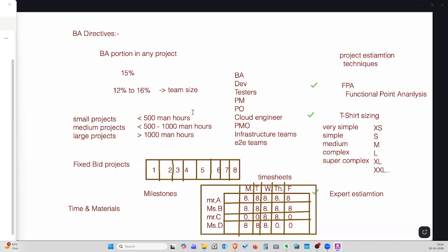And I will release the funds on a monthly basis. Every month you need to show me the progress. If you are showing me the progress, I'm okay and I will release the funds. The first month I need the basement, second month I need the pillars, third month I want the first floor to be ready, fourth month the second floor, fifth month I want you to finish the backyard, sixth month the front yard, seventh month the paintings, eighth month I want you to finish the plumbing and electricity work and make sure everything is completed and give it to me.